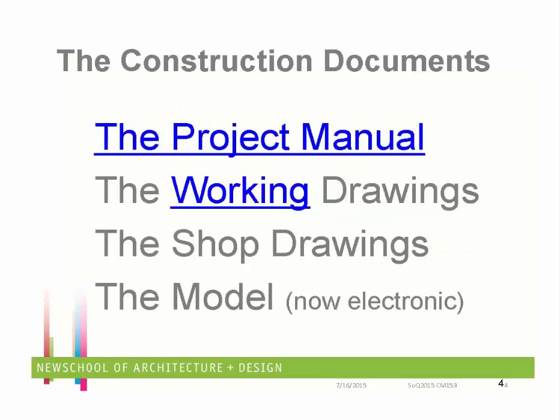So that project manual also includes the specifications. Who knows what the specifications say? It gives you the manufacturer of the product or alternate manufacturers that you can use if they're approved. It gives you the specific details about it, and it gives you the quality standards that you must meet. Okay? So when you talk about concrete, it can be 30 pages detailing what kind of sand you can use and what kind of aggregate needs to be there and what kind of cement you're going to use in the mix and how much air entrainment you're allowed. All these different things, if you tried to put them on the drawings, would just be illegible, because this is the detailed information that the people who are purchasing the work need to know so that they can set up their specifications, their inspections and quality control systems.